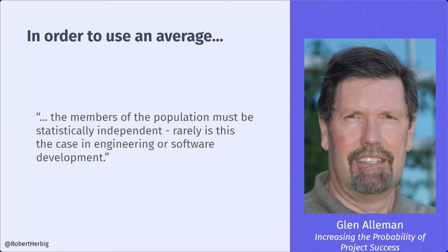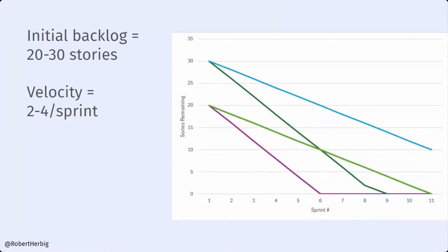If you're learning a new area and something affects the team, or the team has to come to speed on new technology, these are all kinds of related impacts that affect many stories or velocity across many sprints. And so for those reasons, averaging is really a dangerous tool. And lowercase d, I mean that lightly. It'll get you pretty far, but not as principled.